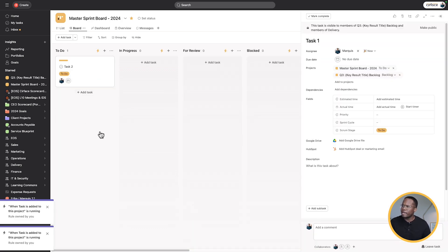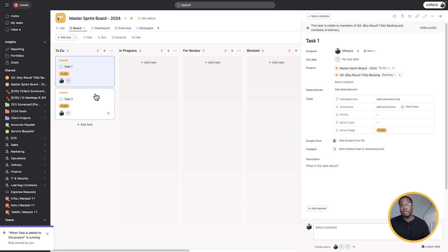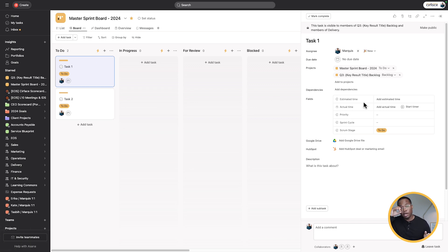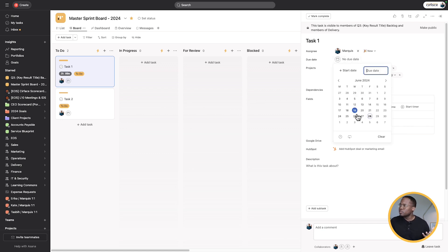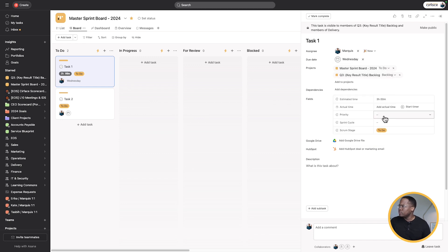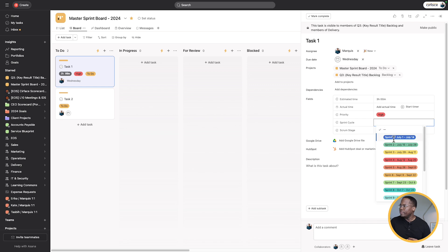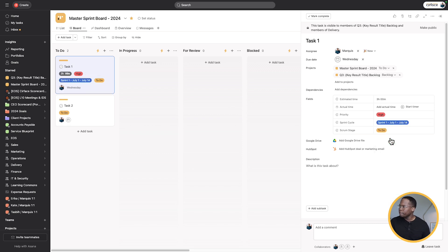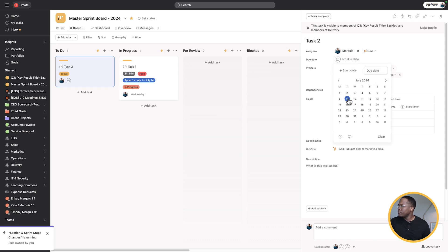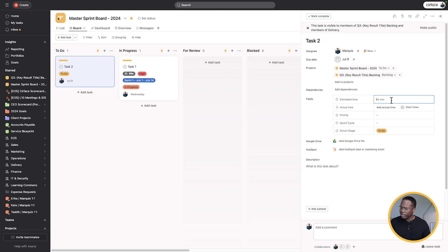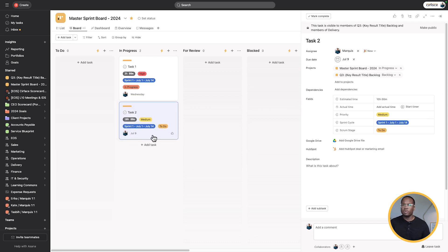I'm going to go over to our master sprint board. We can see our tasks come into the to-do section — they're ready for sprinting. I'm going to take task one: this is going to take me three hours, I'm going to get this done by Wednesday. I'll set priority to high so I make sure to get to it first, and it's going to be in sprint cycle one — imagine we're starting July 1. We have 13 sprint cycles for the rest of the year. Moving it into in progress. Task two is going to take 10 hours, get done the week after — priority medium, same sprint cycle, also in progress.